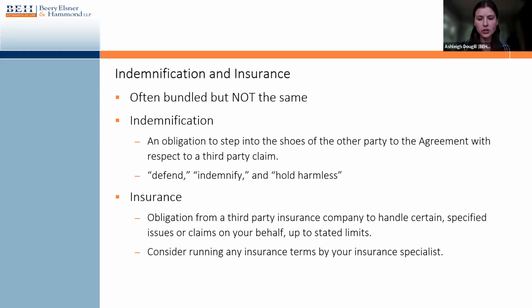So that is indemnification. It requires the vendor, in the event of a third-party lawsuit, to step into your shoes, handle the lawsuit from start to finish, and defend you, meaning take all the monetary risk, monetary obligation of defense.